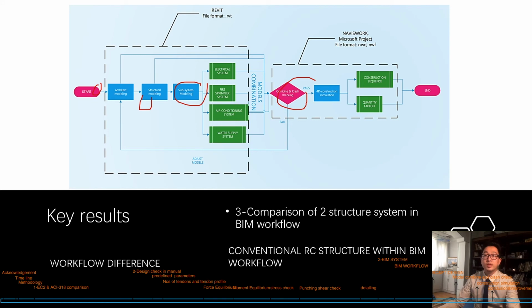In this step, all the model will transfer into Navisworks as an XFO file. And then after a few iterations and adjustments of the model design, the project manager will set up a project schedule and import it inside Navisworks to do the construction simulation. So finally comes out a quantity takeoff, which is a BQ, at the end of the design progress.